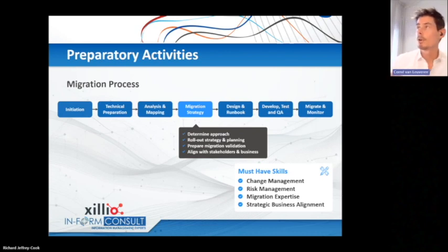And it's also important, especially if you're working with a lot of different content owners, business unit or business representatives, to prepare the migration validation. That's not only the testing, but also what are the acceptance criteria for the migration, when is it going to be validated? Because especially if you're doing tens of different migrations with different departments, you want to have a very structured, well-working process. Of course, align it with the stakeholders in business.